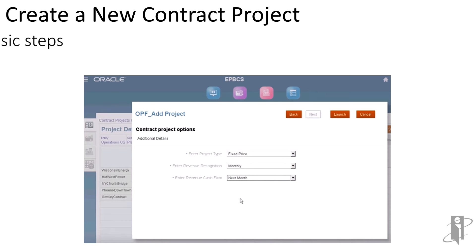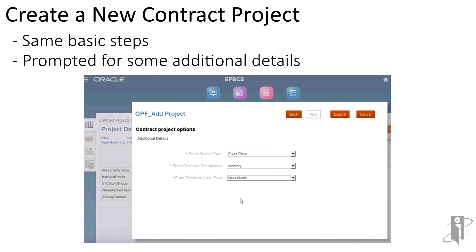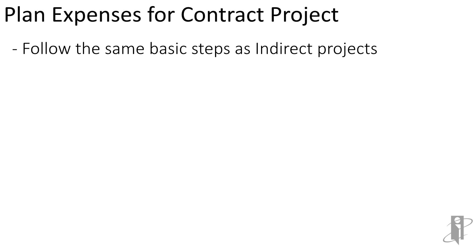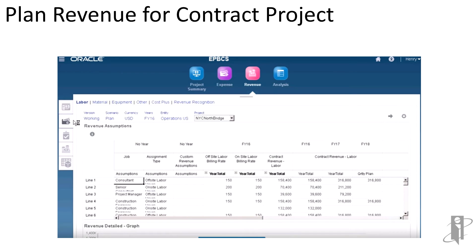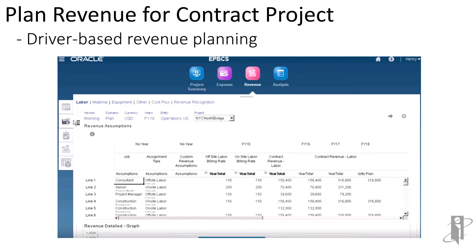To create a new project for contract, I go in and add a project. I'll tell it the type of project — maybe it's fixed price, maybe it's cost plus. When am I going to be able to recognize the revenue? Maybe it's monthly, maybe it's on some milestone basis. When is the revenue going to start coming in? If I want to plan expenses for those contract projects, it's fundamentally the same steps as for indirect projects — I will do labor and then the direct expenses that are not labor-specific. Planning revenue is a little more complicated based on the type of revenue. It could be time and materials — how many hours each person expects to put in. It'll give me different options for calculating that revenue. It is entirely driver-based.